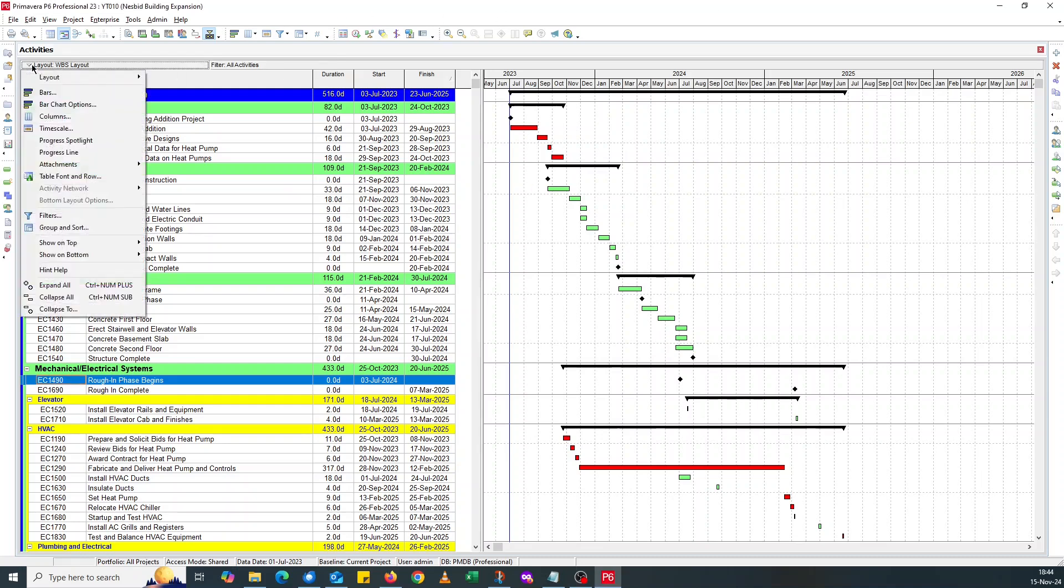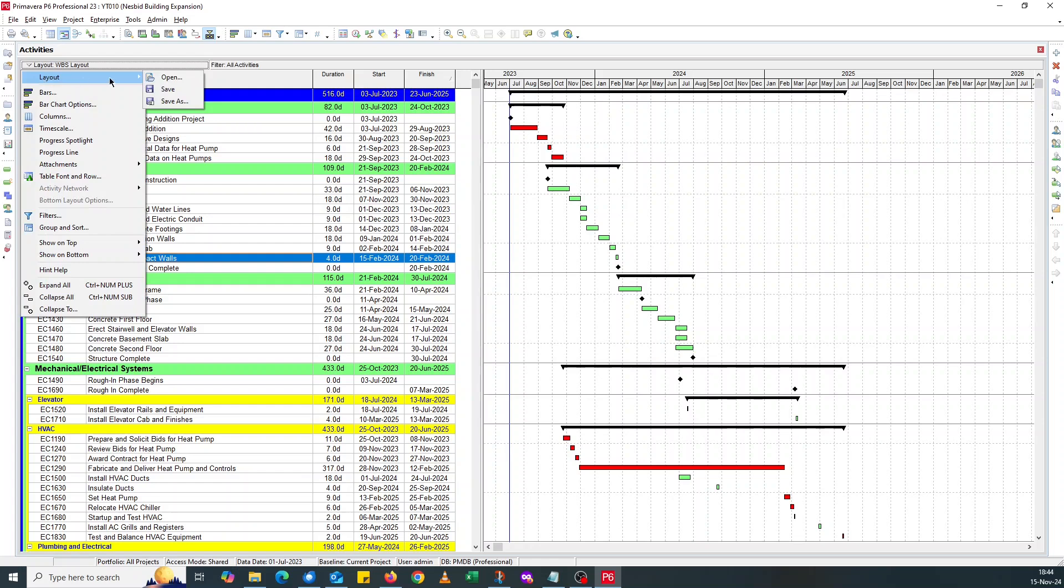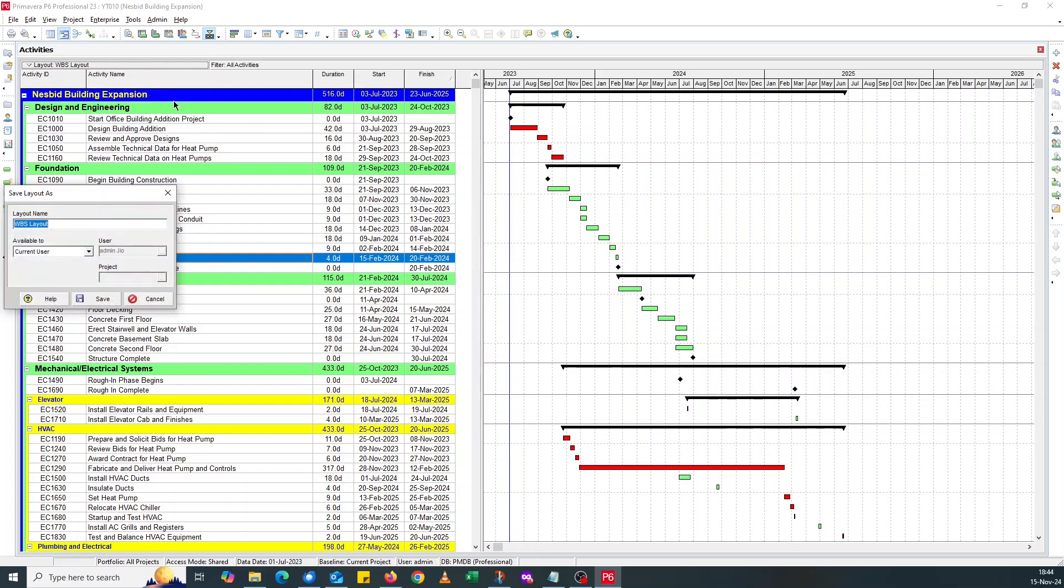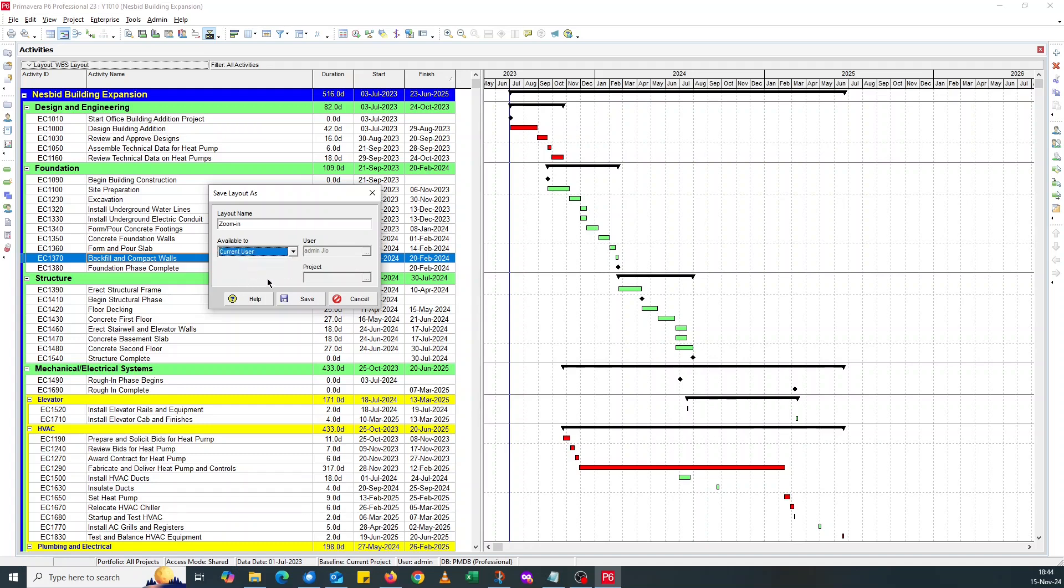First of all, as you know, we've got this layout and your audience are complaining they can barely see what you've got on screen. What I'd advise you to do is create a layout. Just do a save as and call it either Zoom In or Presentation Layout. Instead of saving it as a project layout, I'll save it on the current user and that way you can use it for all your projects, all your files.